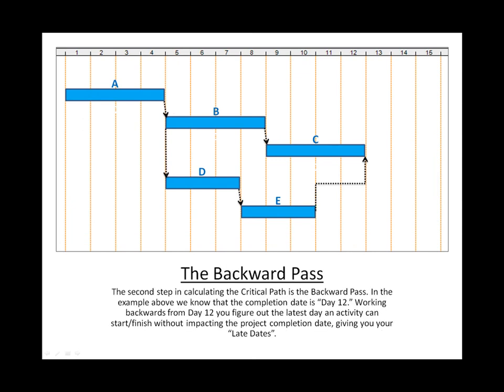The second step in calculating the critical path is the backward pass. In the example above, we know that the completion date is day twelve. Day twelve was the earliest activity C could complete when we did the forward pass. Working backwards from day twelve, you figure out the latest day an activity can start and finish without impacting the project completion date, giving you your late dates.